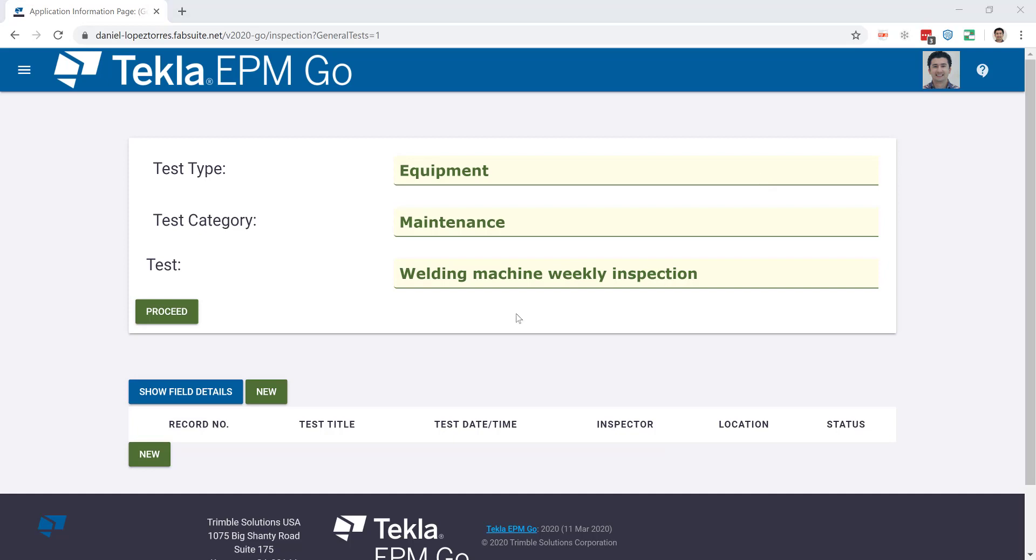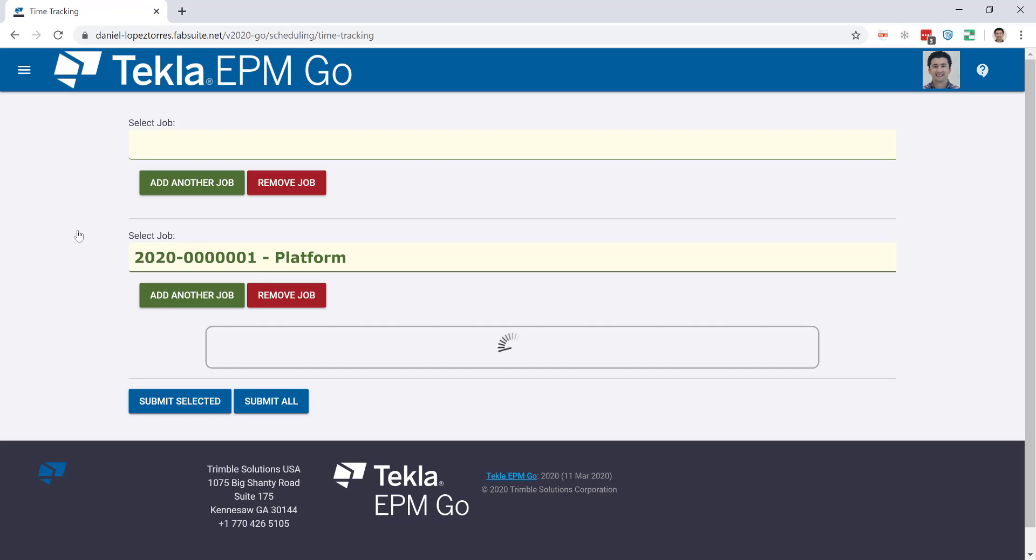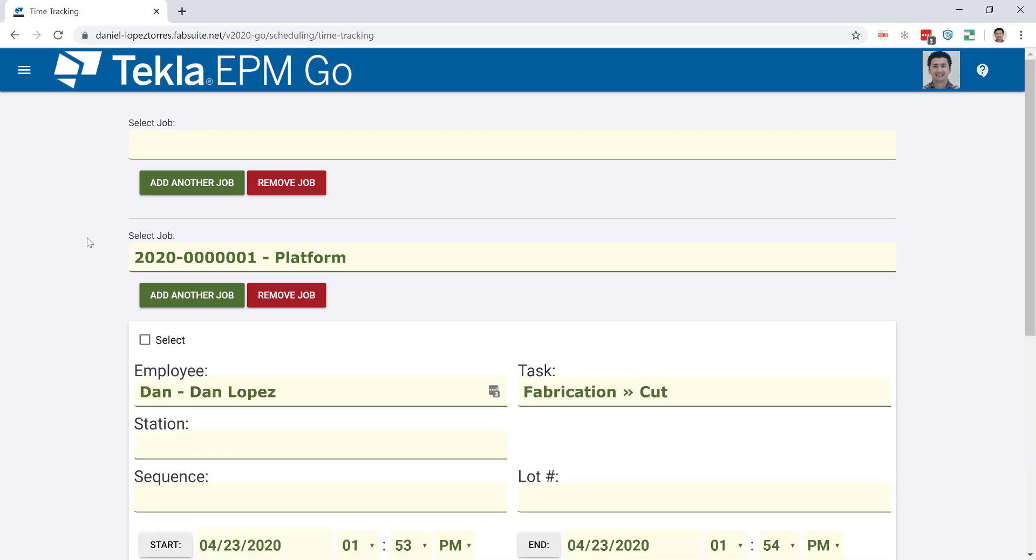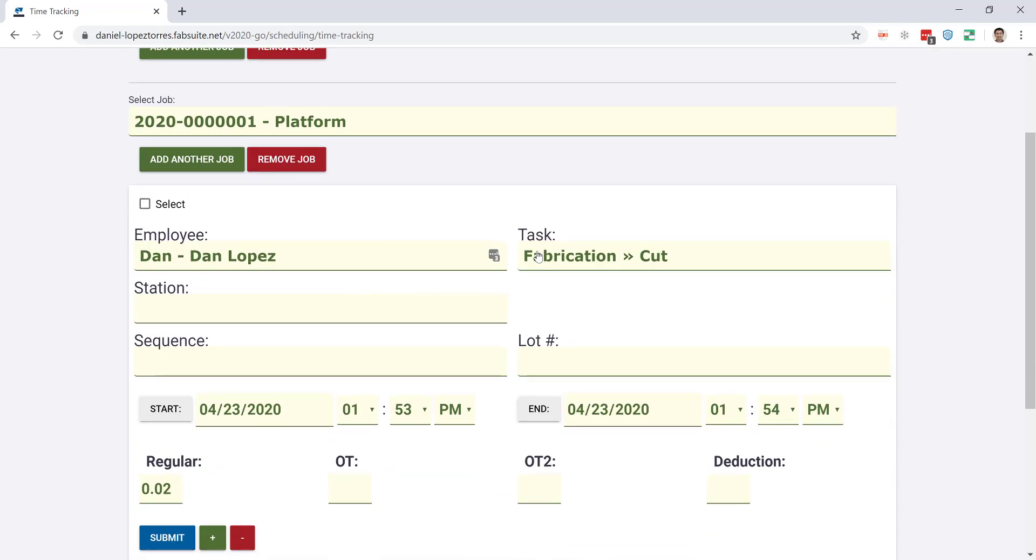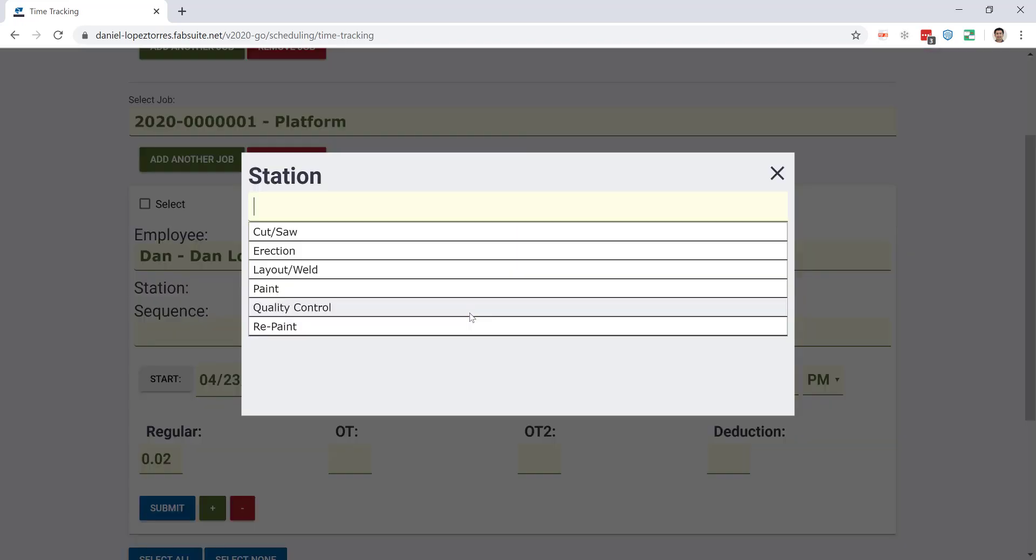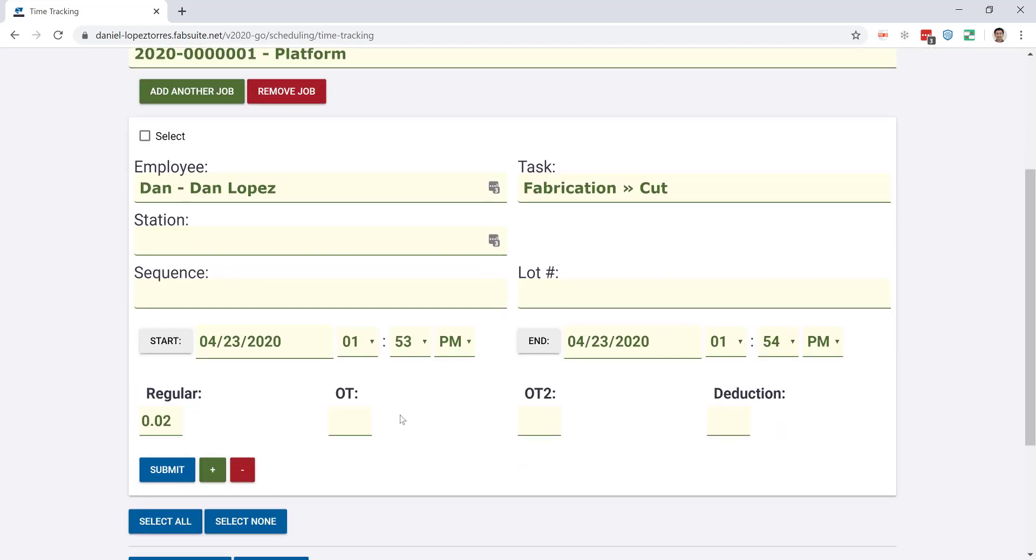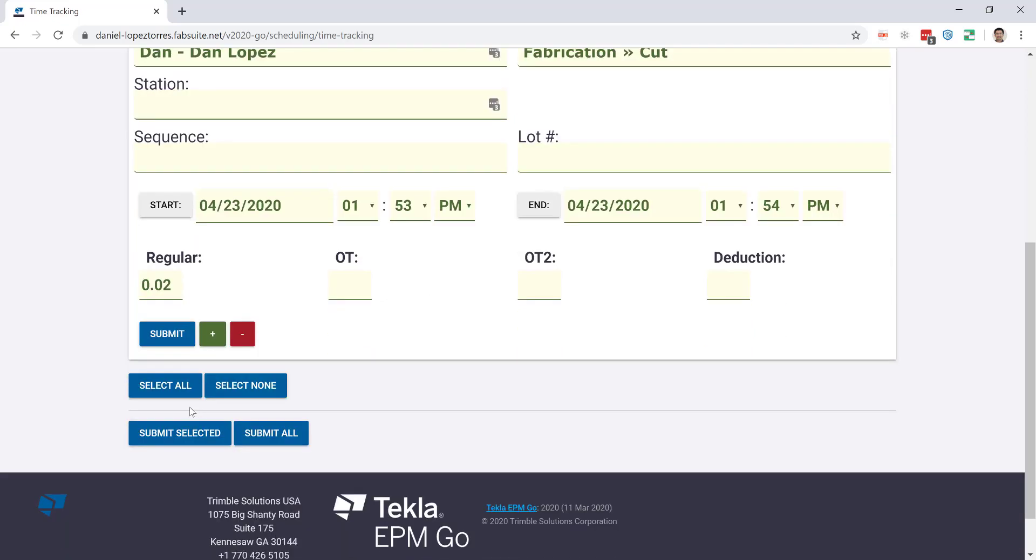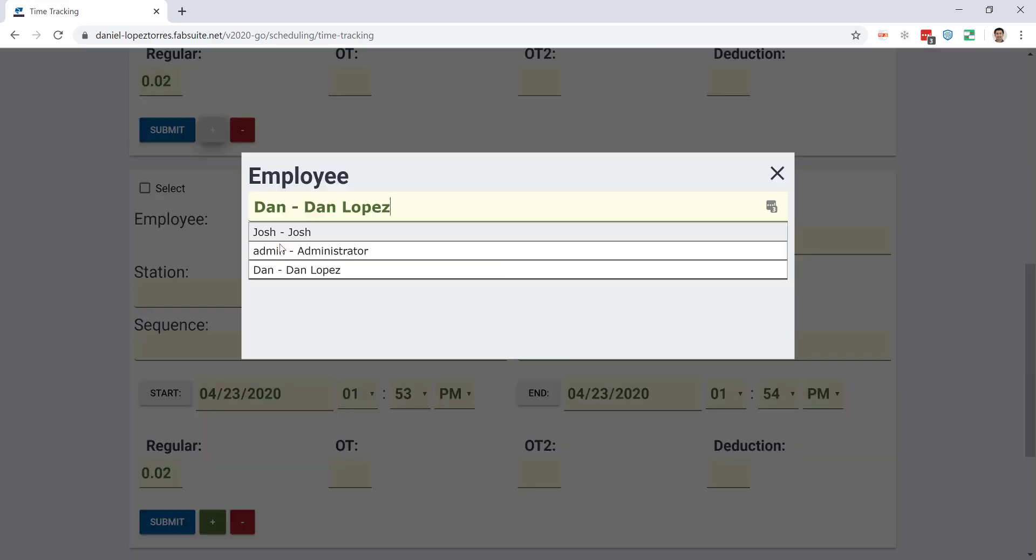The time tracking tool was created to either enter or import time tracking data to be associated at the job level, or if you want, you can take this to the scheduled task level. In that way, regular and overtime hours will both be related to the project schedule and the production schedule, and that will help with a comparison with the planned hours against the estimate.